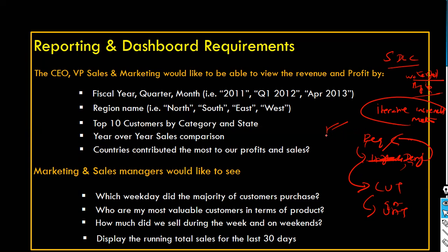The single project itself is divided into multiple phases, phase one and phase two. In phase one they use the iterative incremental model, and whatever lessons they learn, they use in phase two. For example, in phase one we spent a lot of time getting approval from the appropriate stakeholders. You gather all the requirements, document them and share them with your stakeholders. They took longer to approve, and only when they approved could you proceed with the subsequent phase.